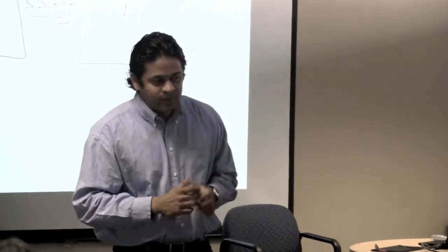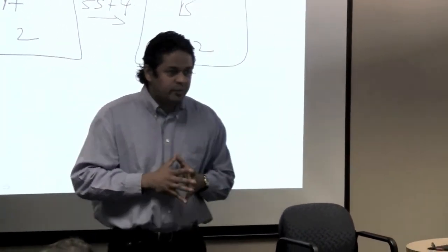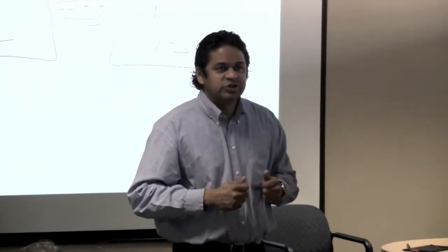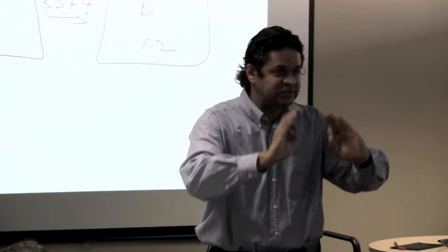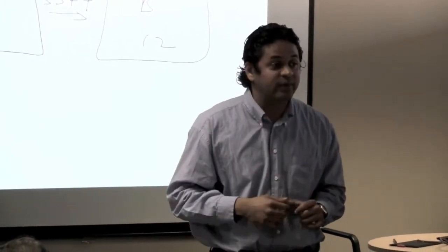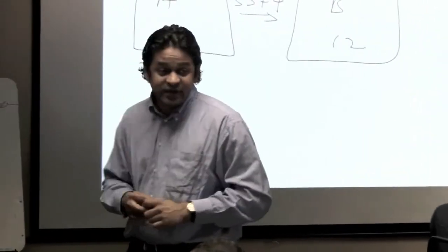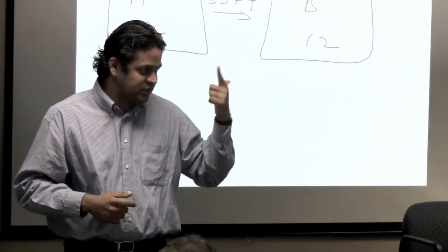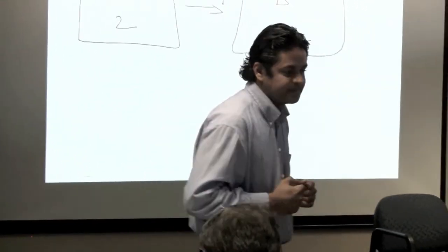Project management. I have no definition of what project management really is, but as far as PMI is concerned, project management is the application of tools and techniques and methodologies to activities in order to meet requirements. Never try to exceed requirements, because every time you exceed requirements, you have to perform extra work. And work carries two inherent things with it, risk and cost. Two things you don't need to be injecting into the project.